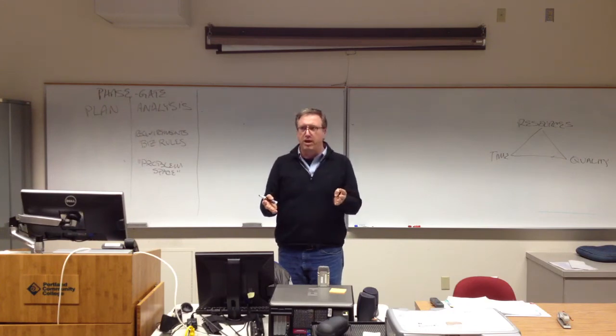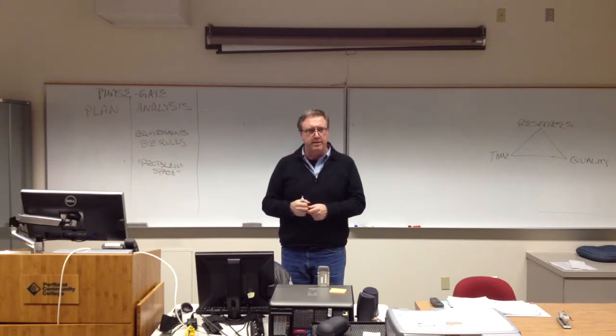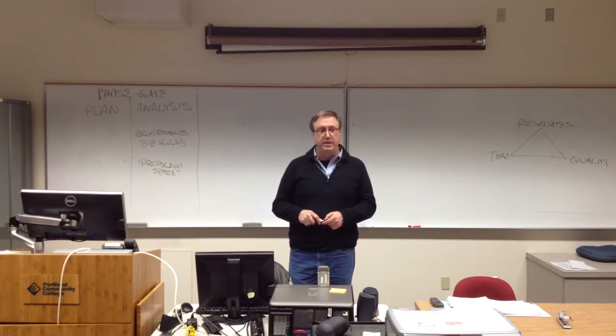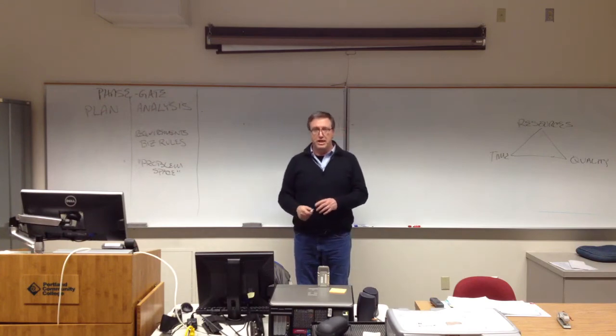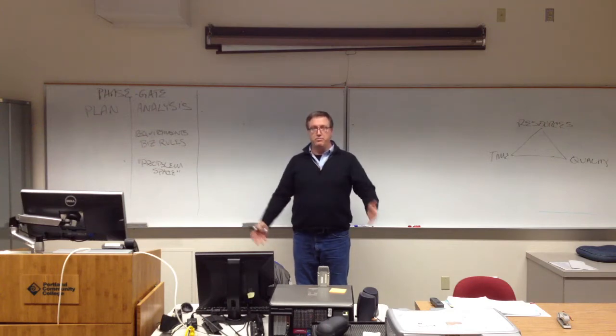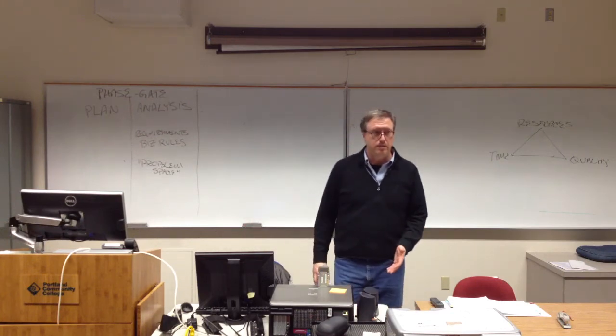If it's an internal project, like I was working an internal IT project, it's like, what incremental improvement can I make that is a significant return on investment? Sure, we spent $500,000 on that system. We took 3 years of 7 people's time. We saved $1 million a year. So in the end, the thing saved the company $2.5 million in its first 3 years, paid for itself in its first year. It's been paying off for them ever since.